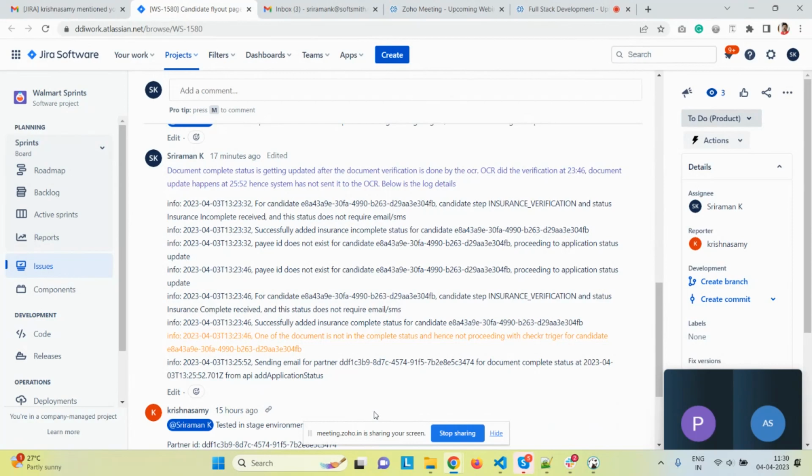So developers have 10% of the work, 40% goes to the testing team, and 20% goes to the DevOps team, who does the building and the deployment. The remaining is for UAT testing and the production-facing people.